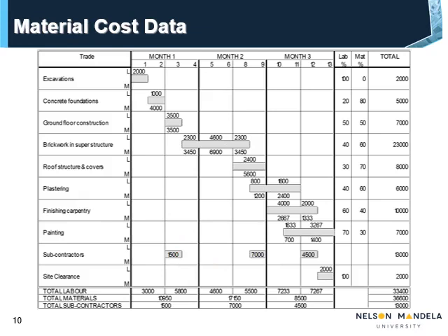Next, we shall consider the material costs. Before we start, just remember that materials will be paid on a monthly basis. Taking this into consideration, it is obvious that the material cost for each month should be added together. We will therefore start with the columns for the first 4 weeks, that is weeks 1, 2, 3, and 4, representing month 1 on the bar chart.